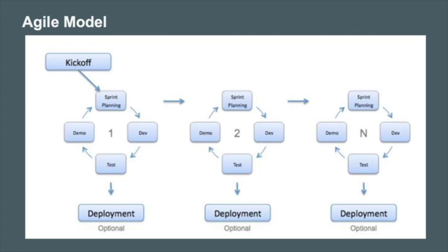The disadvantages of the agile model are, for example, in the case of some software deliverables, especially large ones, it is difficult to assess the effort required at the beginning of the software development life cycle. Another one is there is a lack of emphasis on necessary designing and documentation.